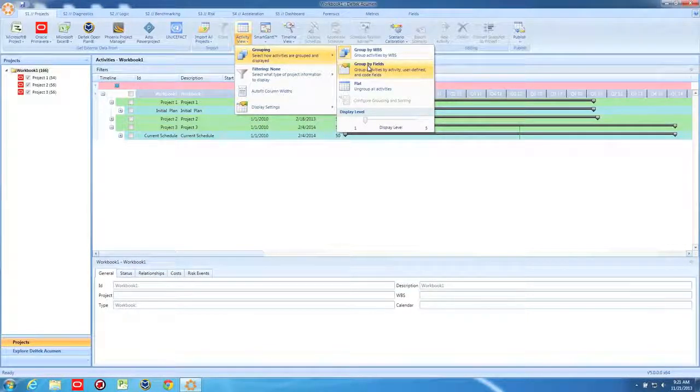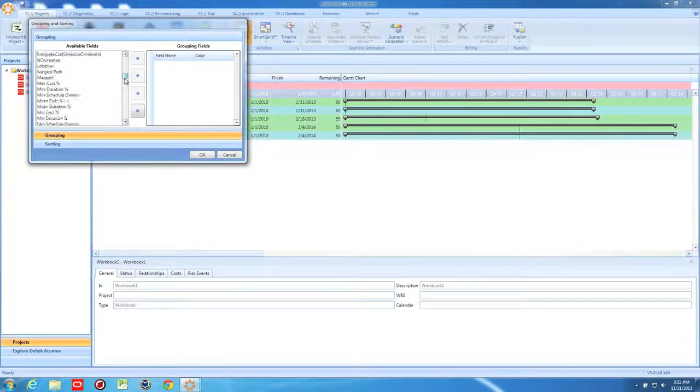In fact, if you get it close, as we talk about in that article, we have a field mapping utility where if one project calls the location field location and the other one calls it place or LOC or something like that, we can use our fields function in the software to get those all lined up so that different field names that are talking about the same thing actually get organized with respect to one another. Anyway, what I have here across my 3 projects is I do have a field in each one of them called location.